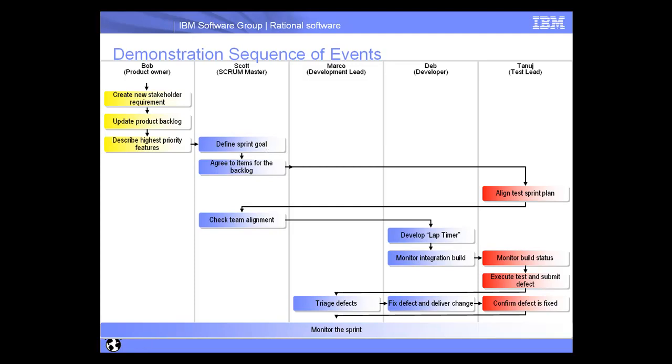In this case, we'll be working on sprint number 3 and agree to items to the backlog. In conjunction, Tanuj over in Quality Manager will start to align a test sprint plan. Scott will then check that alignment and then Deb will begin to develop the new feature for the application. Once she has completed developing the application inside of Rhapsody, she'll kick off an integration build.